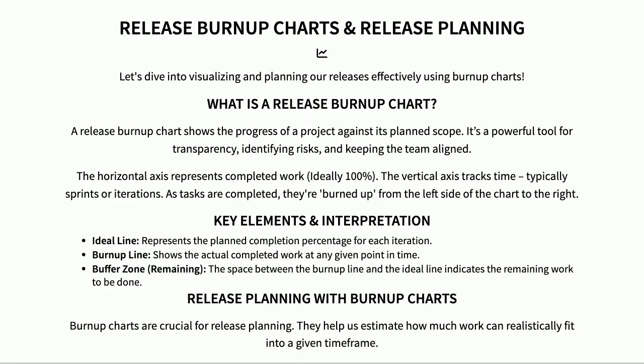Okay, so let's talk about how we can really track our progress and make smart release decisions. We're going to look at release burn-up charts. They are a fantastic way to visualize how much work we've actually completed against what we originally planned. Think of it like this. You have a target line showing the ideal amount of work that should be done by a certain time, and then as tasks get finished, we burn them up across the chart, showing our actual progress. It's super helpful for spotting potential issues early on and keeping everyone on the same page.